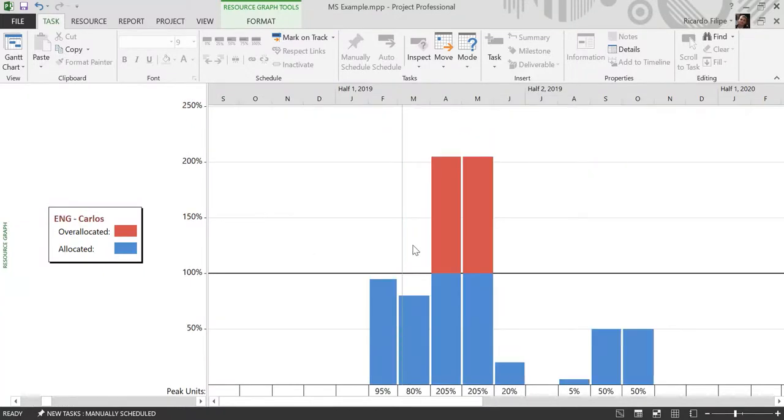Okay, there you go. Basically, because in April and May 2019, this particular resource is over allocated by 105%. That means that if we want to reduce 2 weeks in design, we need an extra resource to cover this amount of work. Because basically, what we did is reduce the lead time. Then instead of doing 40 hours work split in 3 weeks, we have to do 40 hours work in 1 week, and this generates resource constraints.